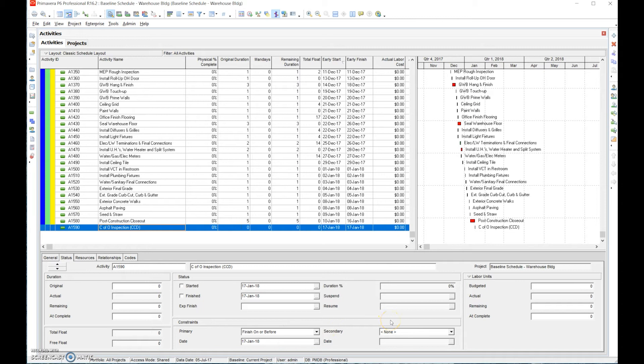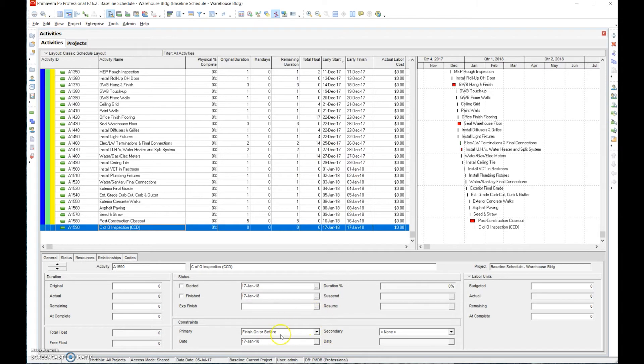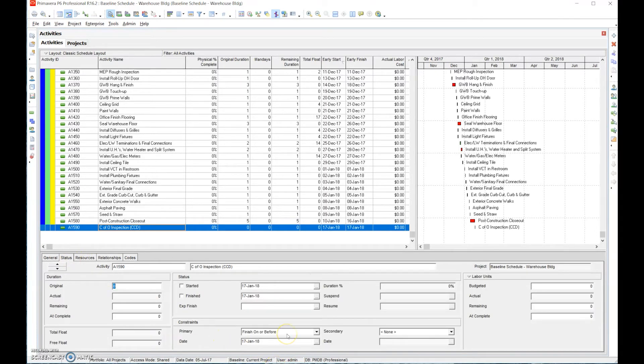Now we're going to come back later. We're going to compress the schedule and make sure it fits into the timeframe we needed, but just know that total float is the amount of spare time related in any activity. The critical path, which is the longest path through the network, which is indicated in red here, should have zero float. So we put a constraint, only one constraint at the finish and only one constraint at the start. Notice to proceed doesn't have a successor. So there has to be some type of constraint, some date constraint.